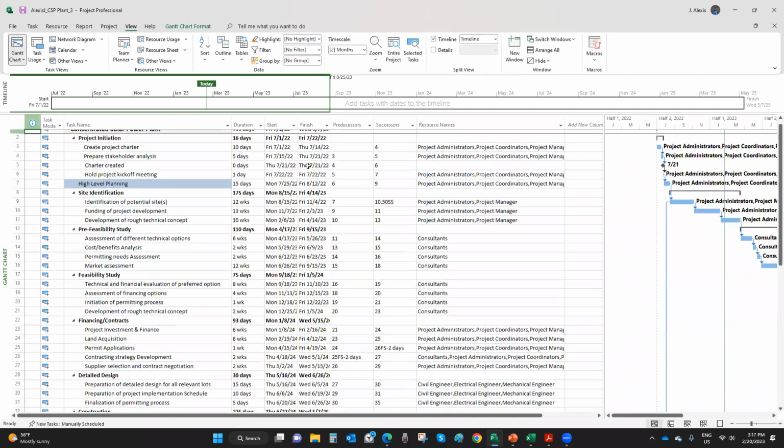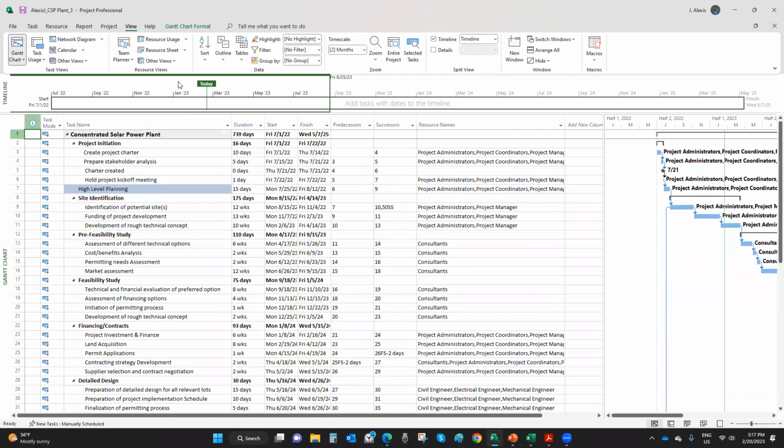What I'm missing right now in terms of creating a baseline is the idea of contingency reserve, right? And I always say that a schedule or a performance baseline without contingency reserve is a bad performance baseline because things can go wrong, so you must add contingency to the plan.